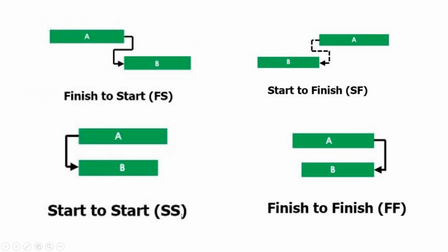Also we have the SS, start to start. Both A and B should start at the same date and time. Okay, and we have finish to finish, so both A and B should finish at the same date and time.